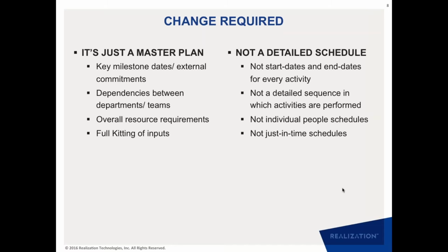And similarly, as far as the inputs are concerned, the trap that you can again fall into is you can say that since we have a detailed project plan, we can manage the inputs on a just-in-time basis, but the reality is that just-in-time is just a mirage, because sometimes when you need those inputs can change, and sometimes the inputs themselves are delayed. So instead of trying to manage every input on a just-in-time basis, what you should be doing is managing certain full kitting points for these inputs, and the project plan is good for managing those full kit points, not the detailed schedule of every input.